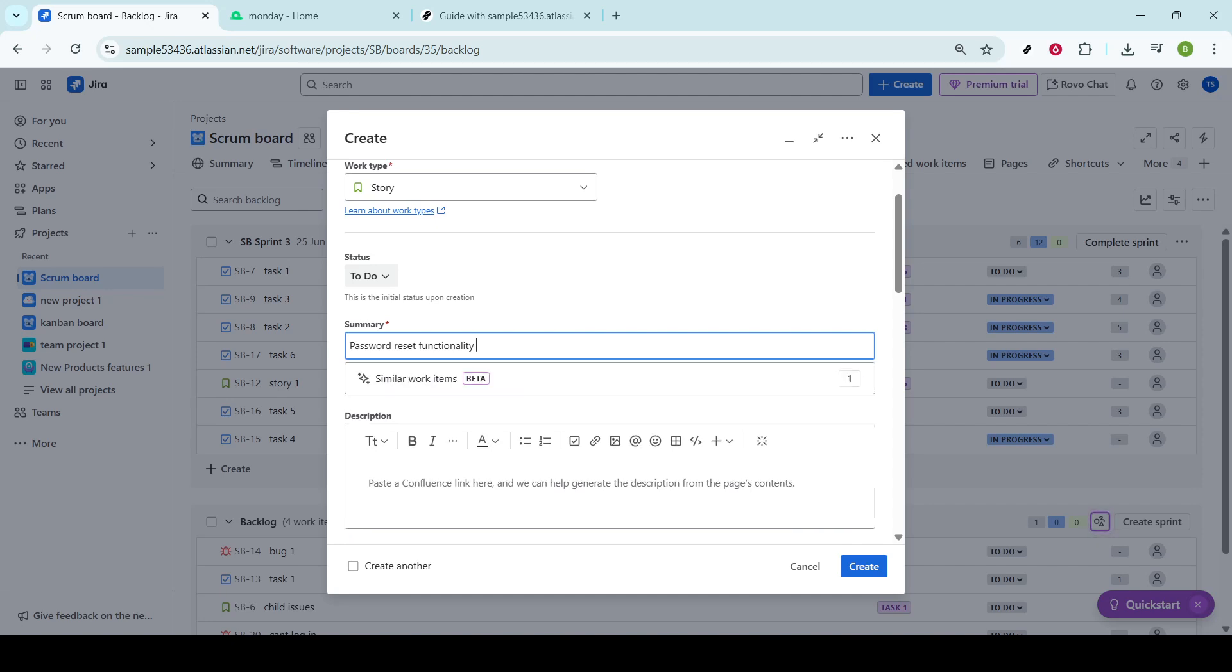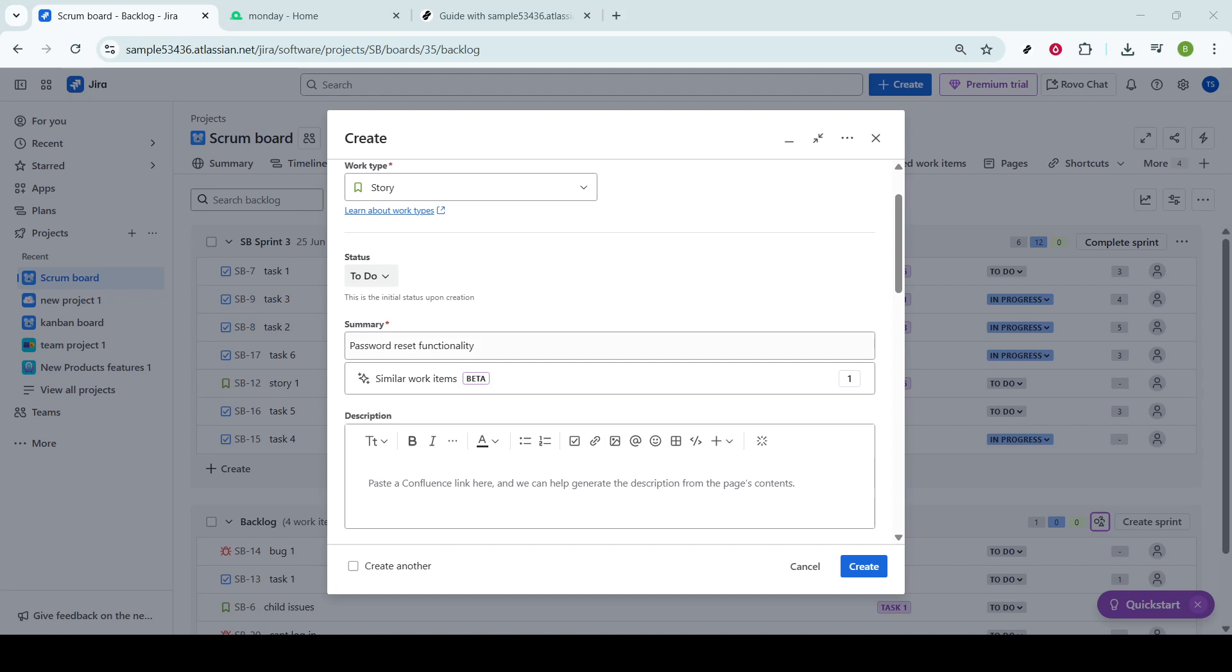The true essence of the user story lies in its description. Here, you'll use a widely respected format that starts with, As a user, I want to goal, so that benefit. This template is invaluable because it keeps our focus on the user's needs and the tangible outcome the story aims to deliver.